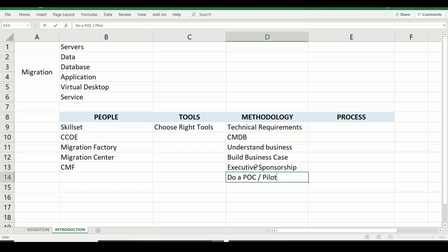And in order to show this, a lot of organizations might have a migration dashboard. So this might be managed by the project management team or the portfolio management team, and you will have complete visibility on where exactly we are, how many workloads we have migrated, what are the different phases we have, what are the different waves we have, where we are currently, what are the risks and issues identified, and what are the lessons learned documentation we have. So all these elements will be captured, and we'll have a complete dashboard.